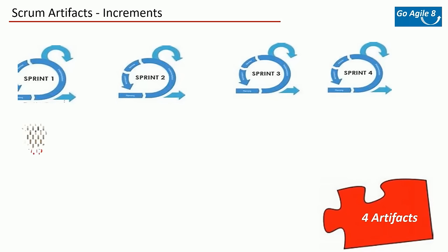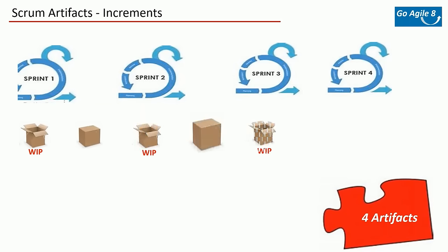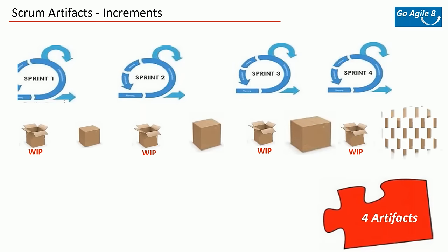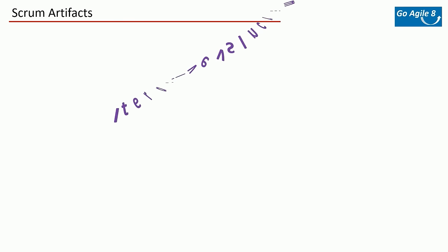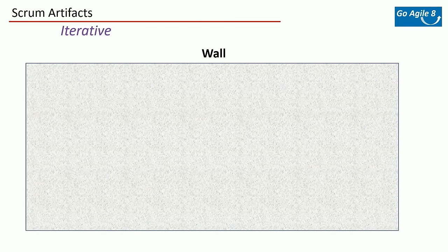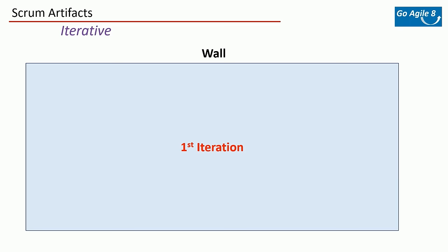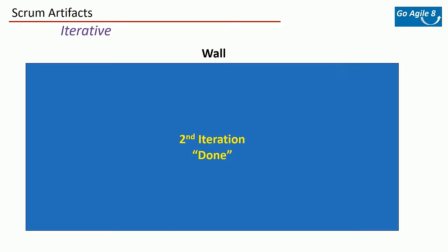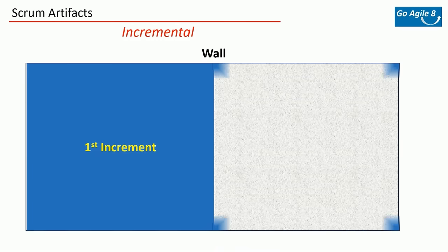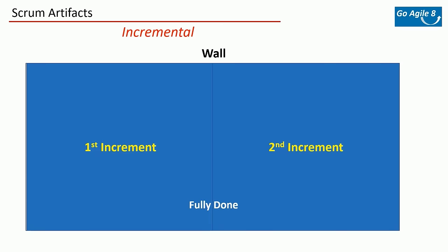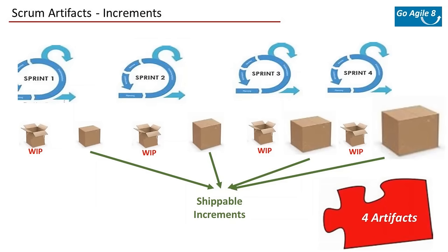The third artifact is the Increment — the sum of all product backlog items completed during a sprint, combined with the increments of all previous sprints. Scrum uses a combination of iterative and incremental approaches. To understand the difference: in an iterative world you paint a complete wall with one coat, then come back next week for a second coat. In an incremental world, you paint both coats fully on half the wall the first week — that half is a finished increment — then complete the other half the next week.